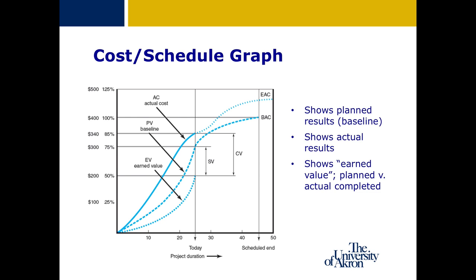The textbook provides an example of a cost-schedule graph to help visually show project status. The graph shows three key groups of measures at a specific point in the project. The planned value introduces a new concept — the total budget for the project is called the budget at completion, or BAC. Actual costs are pulled from the timesheets discussed earlier. The earned value is calculated from the plan and actual costs and used as a basis to determine the cost and schedule variances shown on the graph.